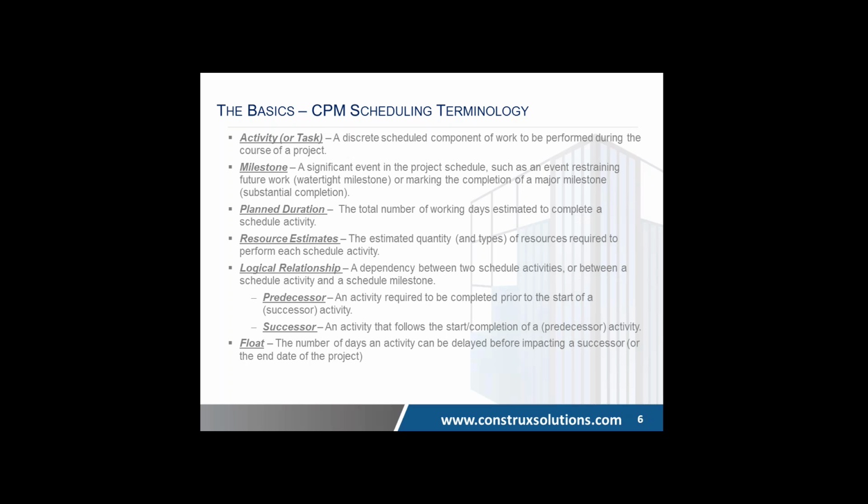If I'm an activity that has a predecessor, then that means before I can either start or get finished, the predecessor of mine needs to get started or be finished as well. Successors, same thing. It's just the opposite. If I'm an activity and I have a successor, that means that successor activity cannot start until I am done or have already started or finished, that sort of thing.